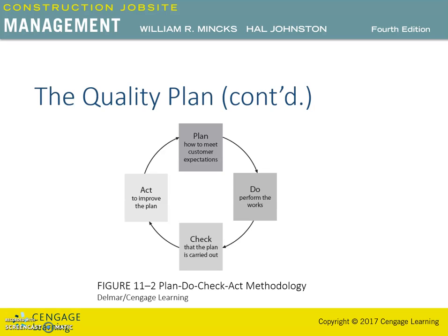The procedures for regular audit of the success and use of the quality management program at job sites by the quality program managers. And similarly, the procedures for an annual audit of the quality management program with upper management, including analysis of the success of the program and the plan to improve the plan for the next year. So the plan step includes many items, and it's a very important step in the plan do check act cycle.